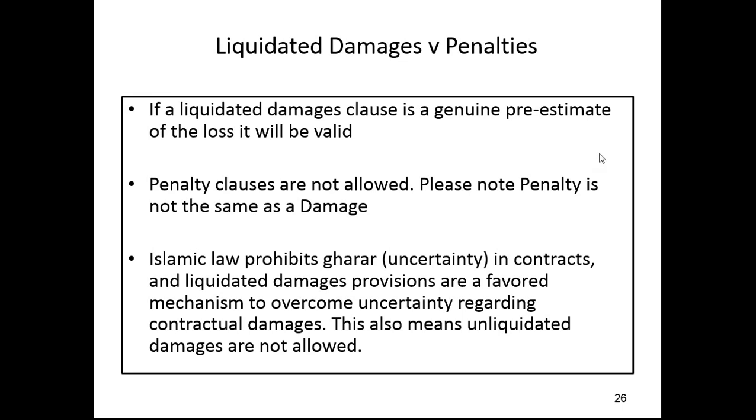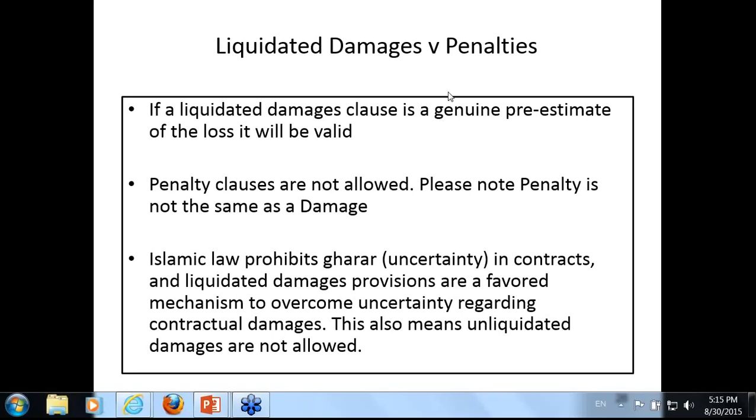So we have to take extreme care. If you end up in a court and the court believes that the clause in the contract is designed as a penalty, you will simply be told to go away. It is not the same thing as damages. One way to get past that problem is to remove the word penalty and replace it with the word damages, and then detail whether they're liquidated or unliquidated and what will happen. But be careful when you design the damages clause. Do not design it in such a way that it could be assumed to be a penalty.